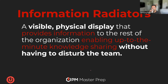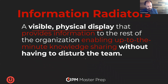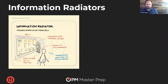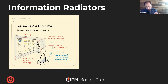Information radiators — instead of the person that radiates information, it's a place that radiates information. A physical display that provides information for the rest of the organization, enabling them to keep up-to-the-minute knowledge sharing without having to disturb the team. It might look like a common area — a hallway, a center of a room, somewhere where people have a lot of traffic. We've got a wall, let's use it. Make it big, make it visual, make it clear. Agile is all about transparency, inspection, and adaptation — this is the transparency part of it.